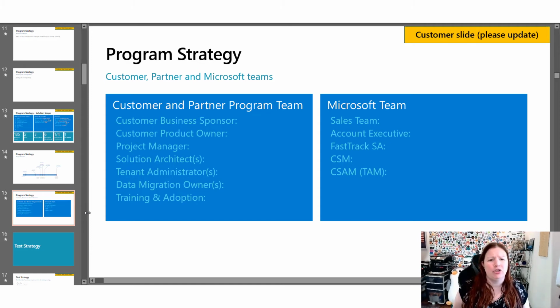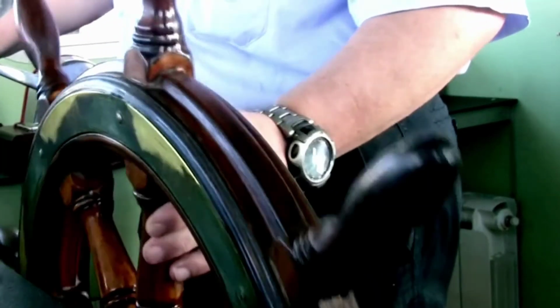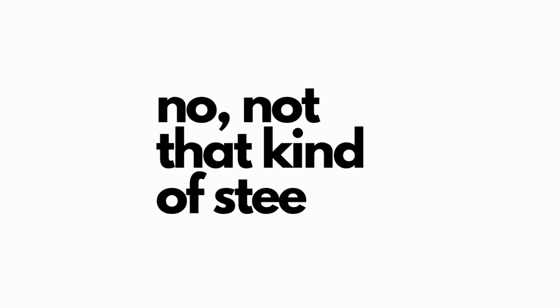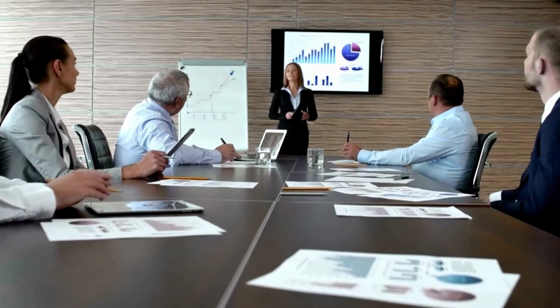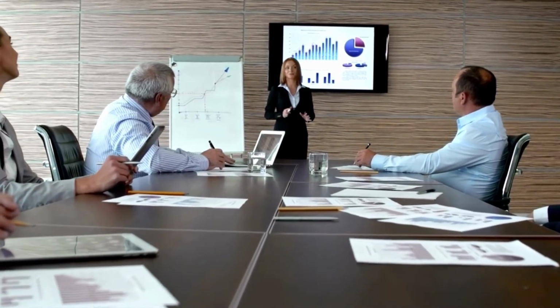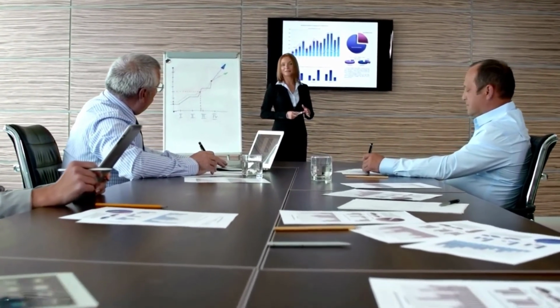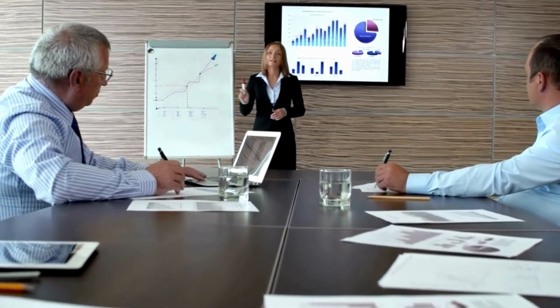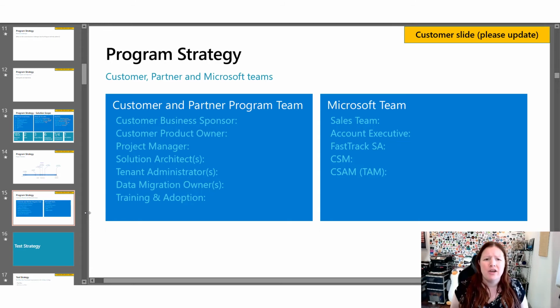Another thing your solution architect will likely look for and ask about is a steering committee and an architecture review board. We do typically recommend that your steering committee is made up of key customer, partner, and Microsoft representation. And for this reason, your solution architect is likely to ask you to include them in the meetings. If you have a steering committee, but it doesn't have good representation from all of the parties, then risk is introduced to the project.